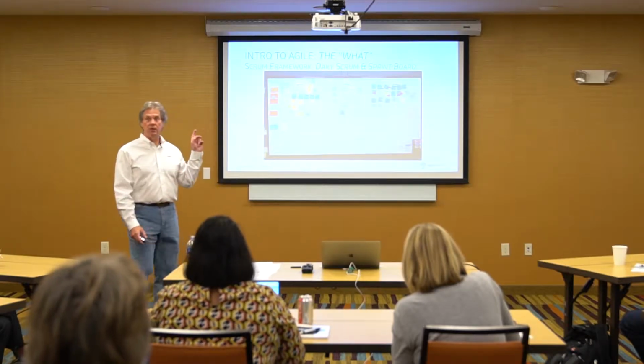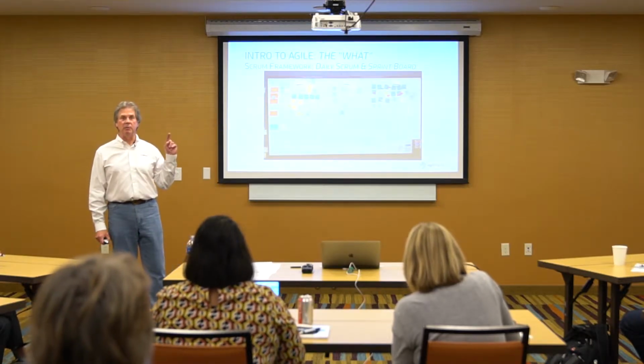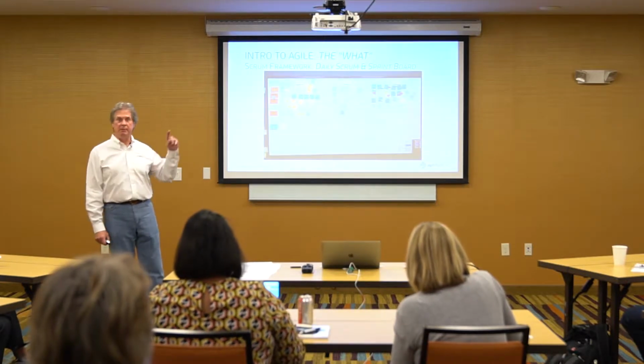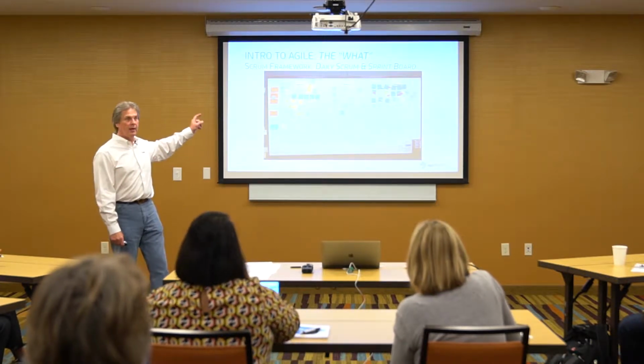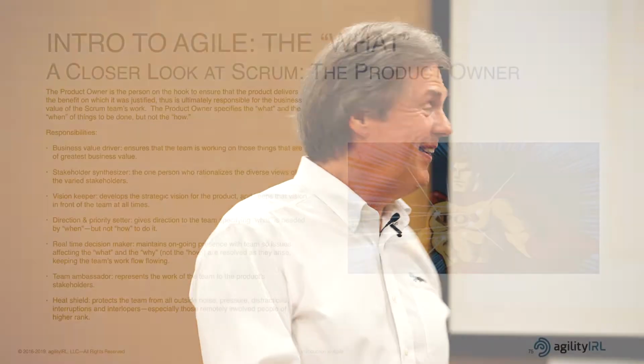Did everybody get this? This is how a daily Scrum is conducted. Each member on the Scrum team goes up to the board, they touch the board, they move a tag, or they explain why they can't. We're going to get into the whole organizational implications.